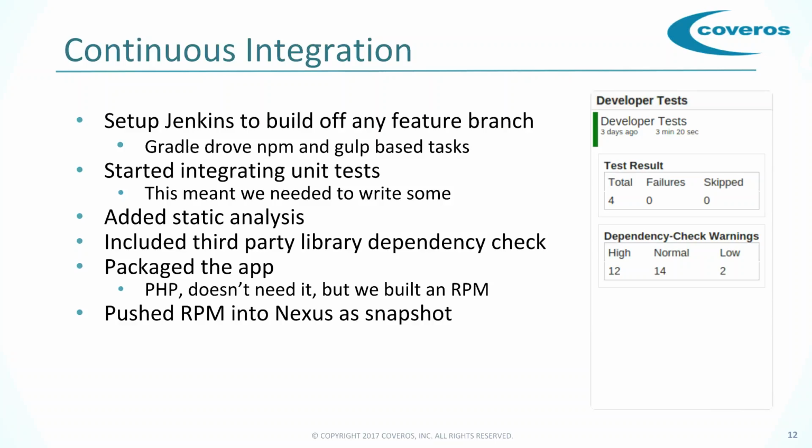Similar to our unit tests, we found that there was all sorts of technical debt, there were all sorts of issues. And instead of saying that we are going to immediately fix all these issues, we said every single time you commit code, we want to make sure that you are not adding more technical debt. We wanted to make sure that eventually we're keeping the code at the same state it was, and eventually we looked at making sure every time you check in code, the technical debt actually went down some. You didn't introduce any new issues.